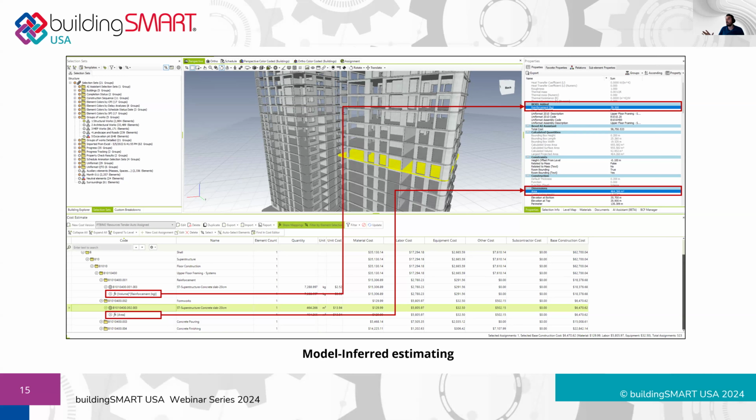I would say yes, if you're building a bridge, maybe it's a wise decision to model the reinforcement, because the reinforcement in a concrete bridge is probably 40% of the price, and there are many additional risks that are not related to the pricing and estimating that imply that you should model these elements in such an engineering structure.